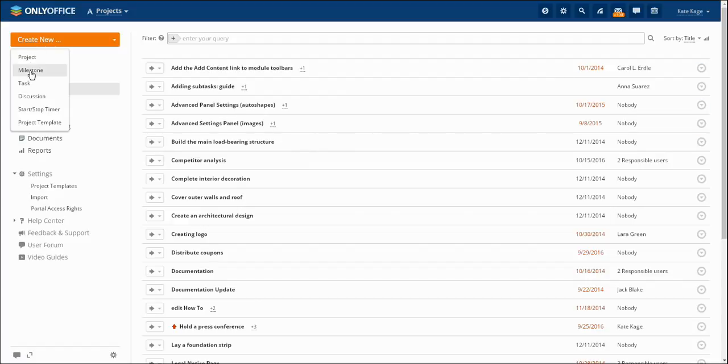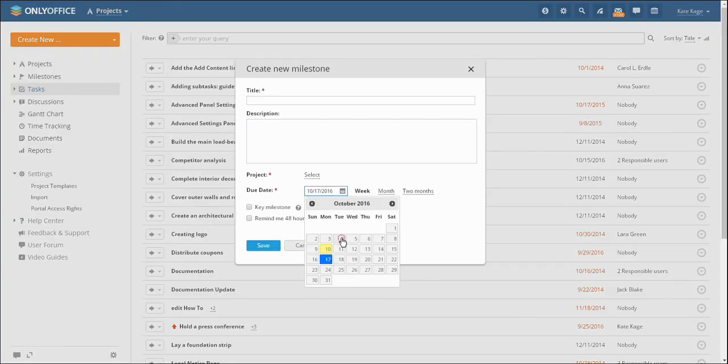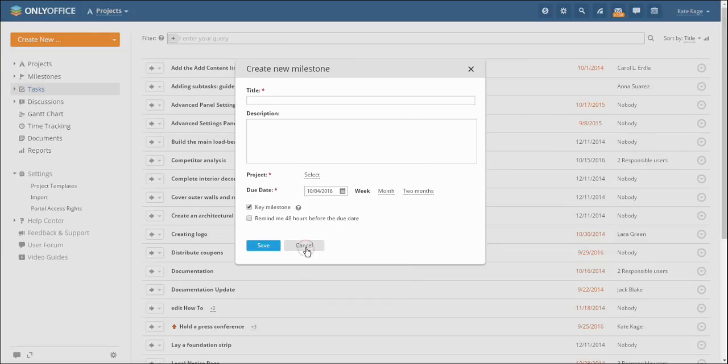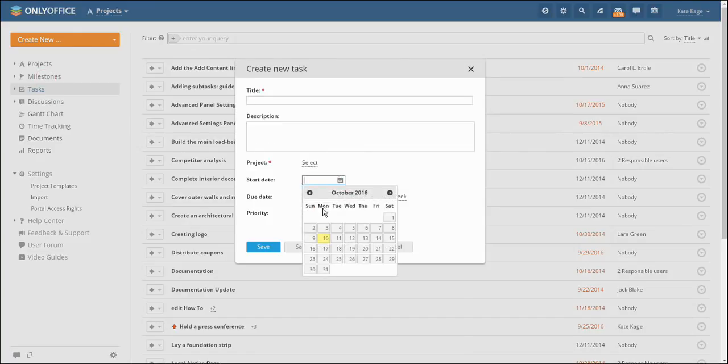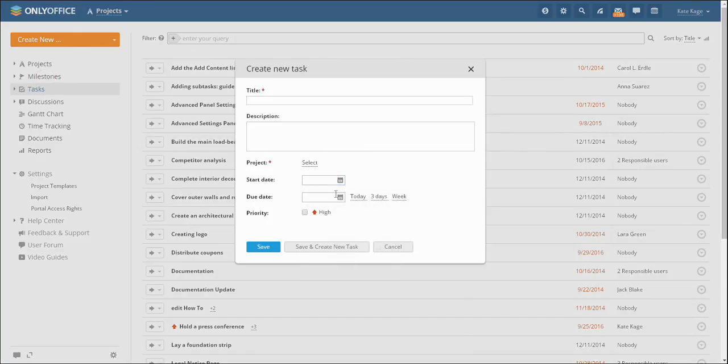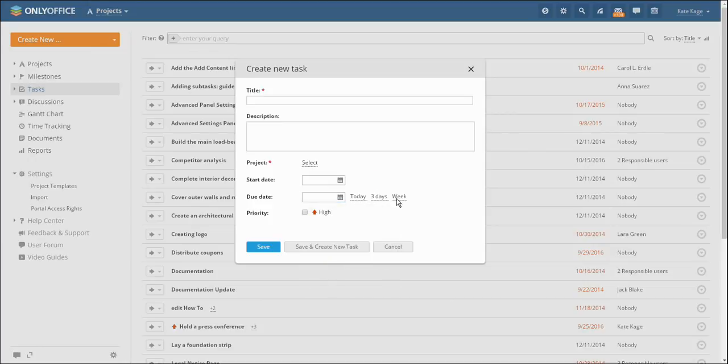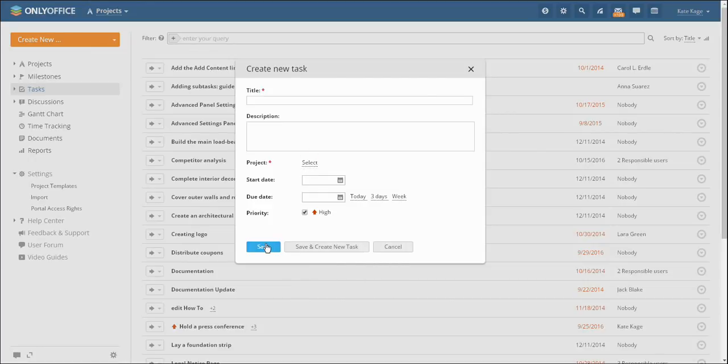While creating milestones, you may assign a responsible person, due date, priority and choose a project to link the milestone to. While working on tasks, you may assign the responsible person, priority, start and due dates and link a task to a project or milestone.